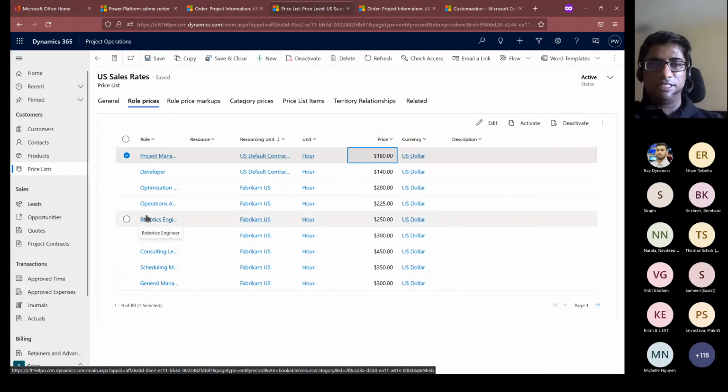So these three aspects we had set: the contracting unit, and the work hour template, which is like a timetable, right? These are the available hours for you. You assign those work hour templates to your resources, and when you do that, the schedule board will reflect when this resource is available to work. And then you can assign your projects or tasks to them from the schedule board.